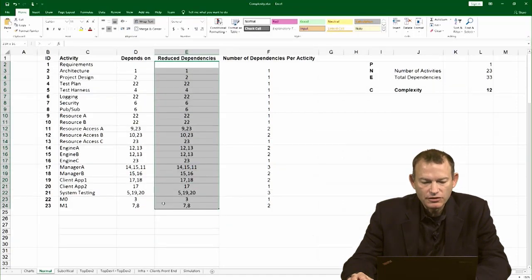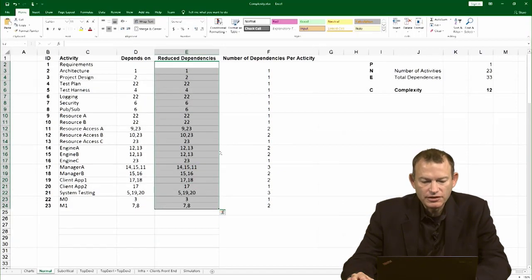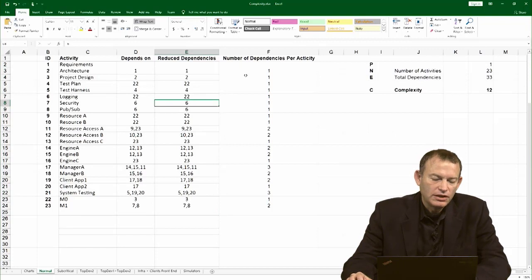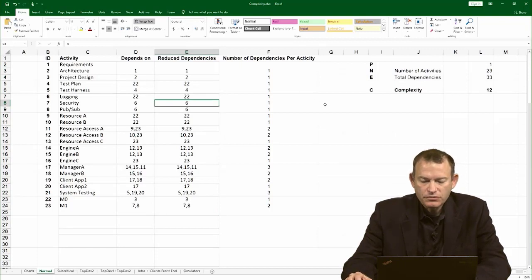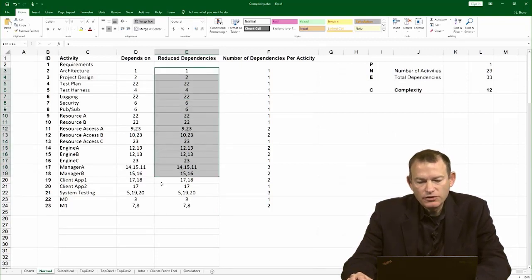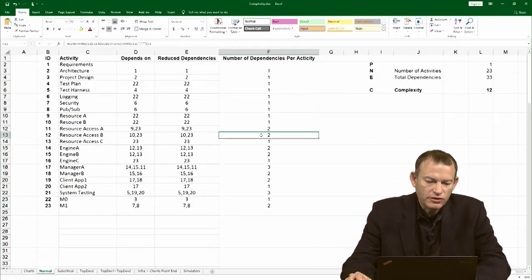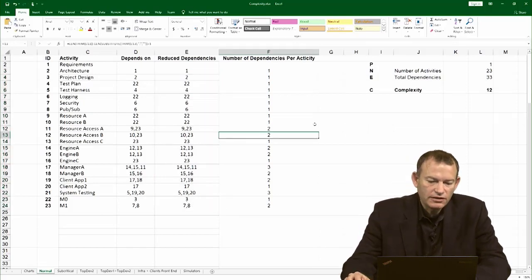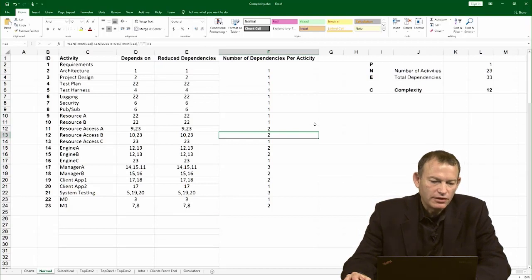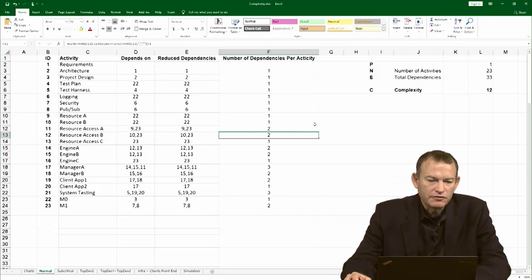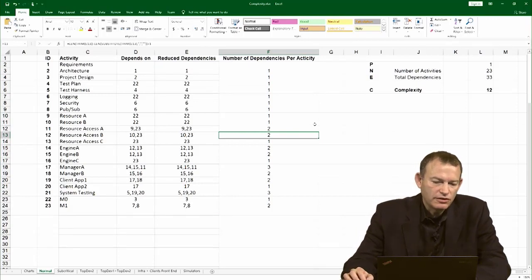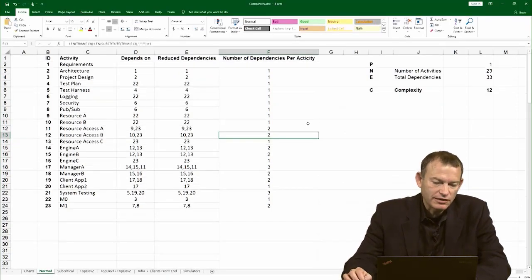So, first thing you do, you carefully traverse the things and make sure that there's no additional dependencies. The next thing you need to do is count how many activities you actually have here. Now, this is a simple project. You can actually see that there's two activities over here. But what if instead of 20 you have 200 or 2,000 activities?